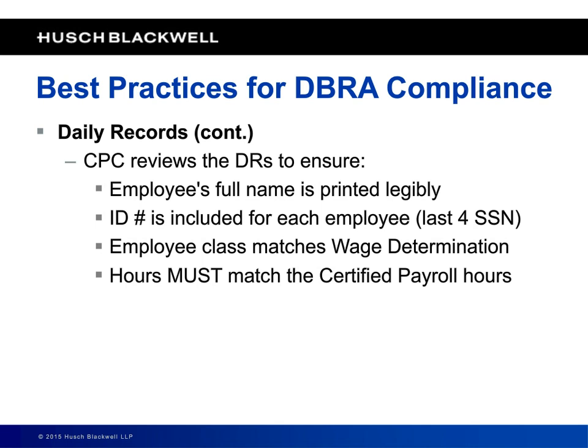But once that record is received by the superintendent, they then should forward it up to the certified payroll clerk, whoever this individual is that's going to have primary Davis-Bacon Act compliance responsibilities inside your job site trailer. They are going to review that daily record to make sure that everybody's listed, that there's some sort of identification number, usually the last four of their social, that the classes the individuals worked in are listed, and that they match up to something that's on the wage determination, and that the hours make sense. And we'll talk about comparing those to the certified payrolls in a little bit.